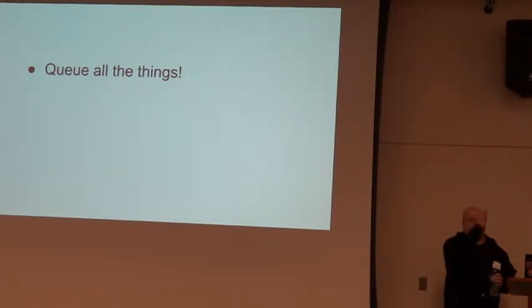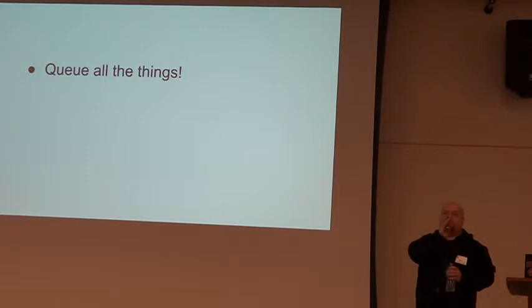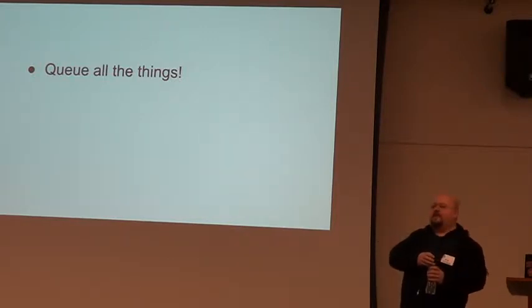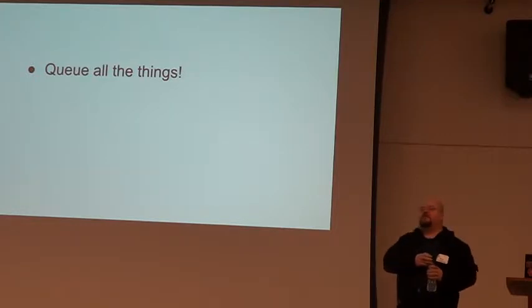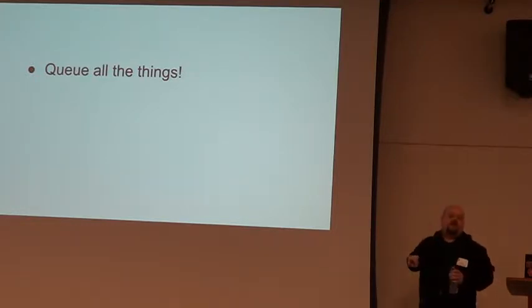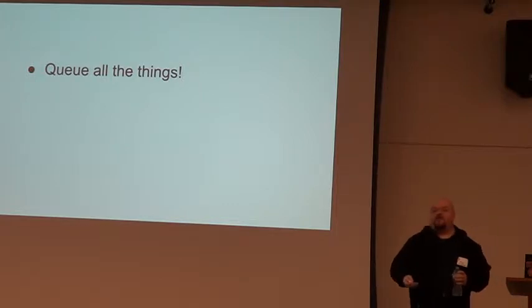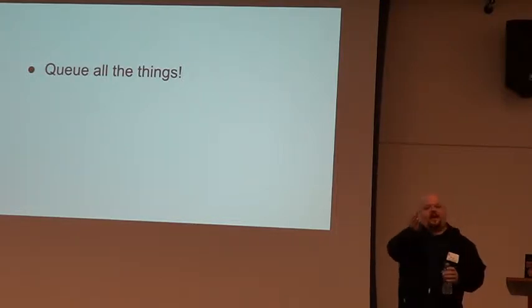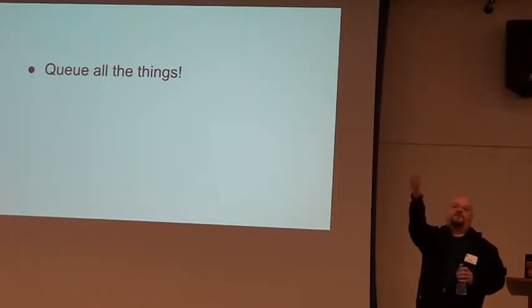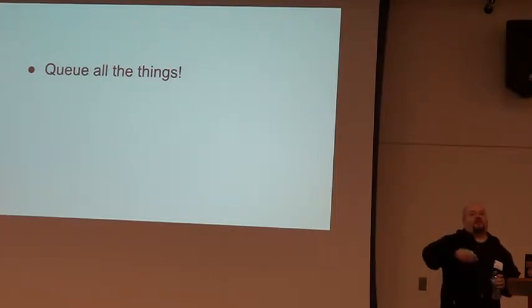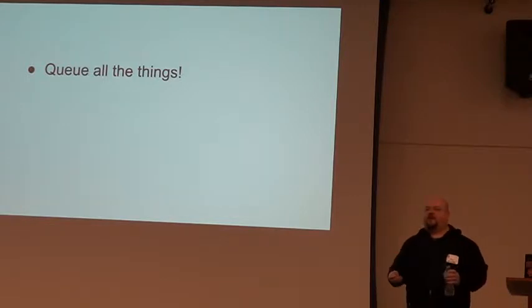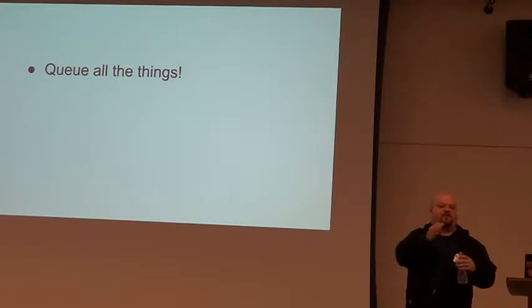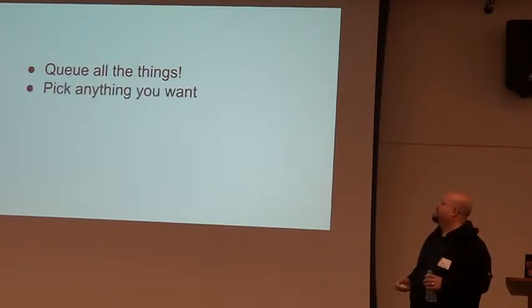So, you may have not just the back queue of what we need to do, but it may be in current development, it may be in design, it may be in a lane called waiting for testing, or waiting for quality assurance or whatnot, right? So, we're basically going to have these items work across the lanes, but we're going to have queue points wherever items can get backlogged or take longer or whatnot, because we never want to have, we always want to be able to tell where things are, but we don't want to hold things up along the way if we don't have to, right?